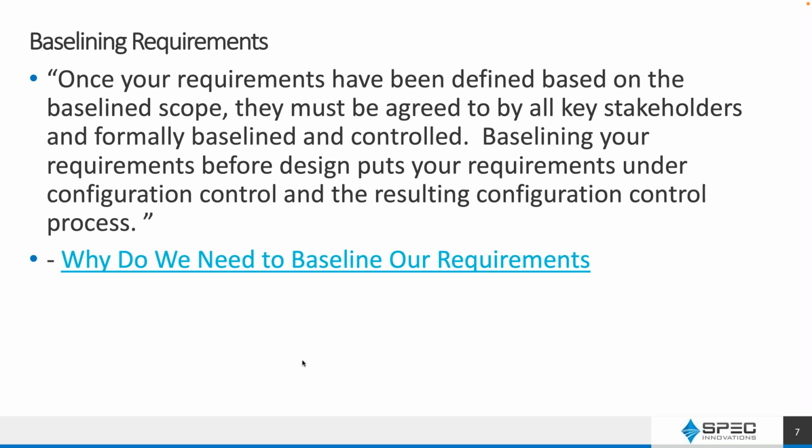We have to be very careful of, well, we got to have that feature now. No, that's not part of the plan. We're going to have to put that in later. We schedule that for a later release because that's what you have to do. You cannot do all the requirements, everything everybody wants at once. It's just not possible. So you want to baseline those requirements and work with them.